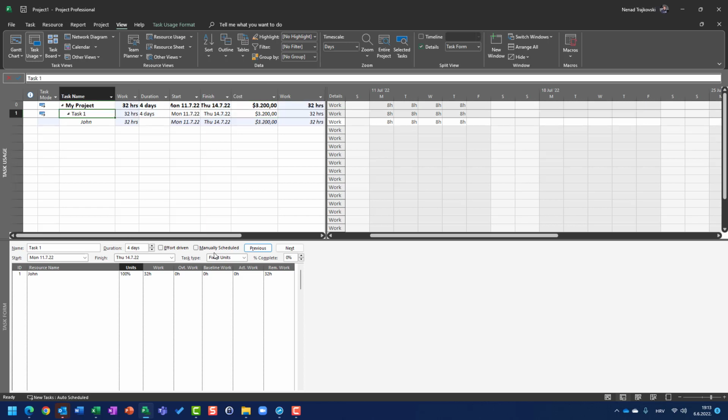So, once again, back to the start, and I will put here, let's say, 16 hours of overtime work. Now, be very careful. You can expect that when I put 16 hours of overtime work, John is going to work in total 32 plus 16 hours, which is 48 hours. But this is not what is going to happen. You can see that I still have 4 days, 32 hours. If I click on OK, John is going to work 32 hours, but I put 16 on overtime work.